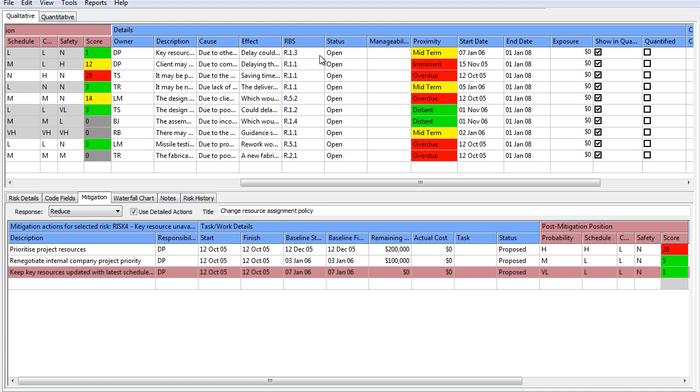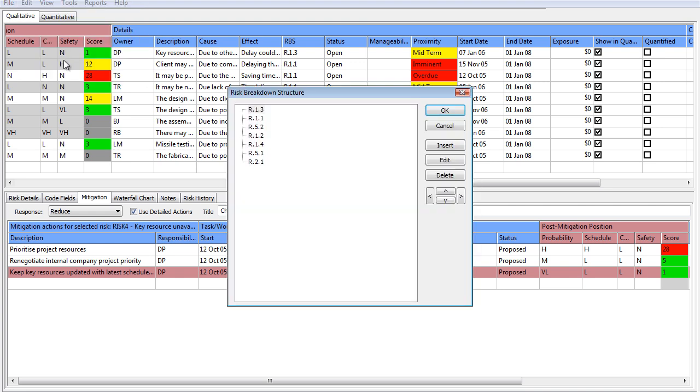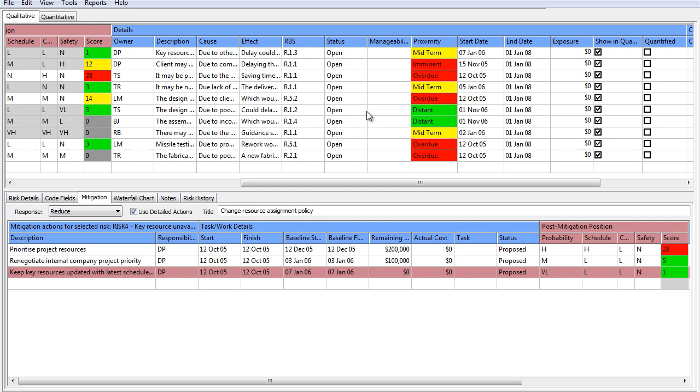The risk breakdown structure, owners, risk breakdown structure is really for reporting purposes too. You've got a lot of data, being able to separate out some of these things. So say, for example, I've got a simple breakdown structure here. I could do it by safety, political, anything that you can think of. That's one of those things that's a bit open-ended as well. But putting in a risk breakdown structure, if I said, well, I only want to see procurement risks, I could pull those out. Or I only want to see downstream oil and gas risks. However my breakdown structure is.